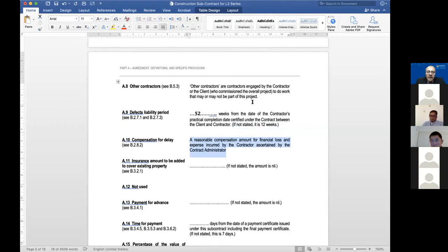If in the main contract, the contract sum is 500 million, the liquidated damage is, I'll exaggerate, 1 million per day in the main contract. And if in the subcontract, assuming the subcontract is a critical activity, the contract sum might be only 2 million. Out of the $500 million job, it's a subcontract for 2 million. It's for the cauldron for the Olympic Games in Papua New Guinea, okay? And it's the very last activity. It will take 1 month to install the cauldron.